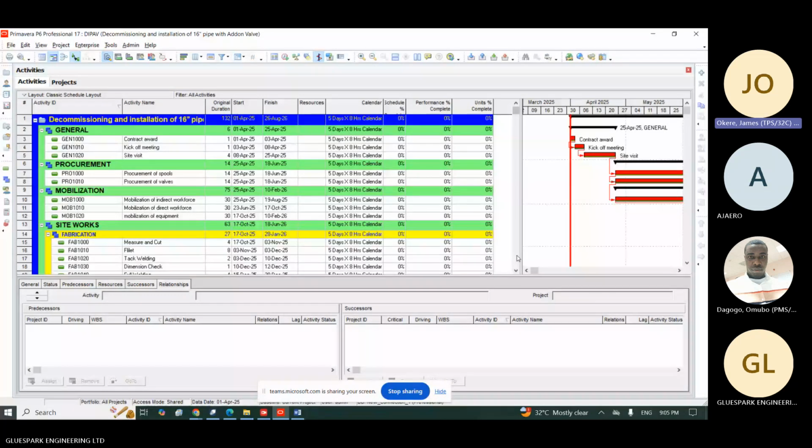We also use a site engineer, one site nurse. So the project manager can just tell you, use pen or Excel, write out the personnel he felt will be used in this project. So he's not out of track, right? But as a planner, there's what we call productivity. So you will work in line with the productivity rate of those workers to generate tangible resources. And when you generate it, you now load it in your schedule.